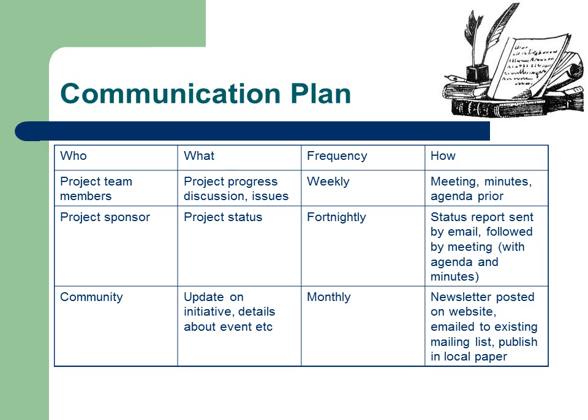This slide illustrates a simple communications plan for the School Fate project we talked about in earlier modules. Who do I need to communicate with? Firstly, the project team members. We need to discuss project progress as well as any other risks or issues. It's best that this is done weekly through convening a meeting. Of course, an agenda will be distributed before the meeting and the meeting will be minuted. Secondly, the project sponsor, the headmaster, must be given a regular status report.